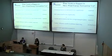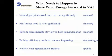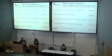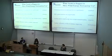So what needs to happen in Virginia to make things move forward? First of all, and the biggest issue right now, if you want to call it an issue, is that natural gas prices are really, really low. For us as a regulated utility, when we go before the State Corporation Commission, we have to show that we're being prudent and that our project is cost effective. They're there to protect our rates. So if you take a wind project right now, they're going to compare it against our combined cycle turbine, and it's just not going to compare. They will not approve a wind project, whereas a CC or a CT, because gas is driving the market right now, would get approved.